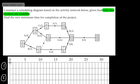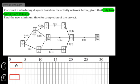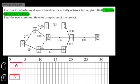Let's start with Worker 1 — we give them activity A, which can start from the beginning. I'll write A on the scheduling diagram and mark it off. Worker 2 is also ready to start, so we allocate them activity B and mark that off too. Once Worker 2 has completed activity B, we consider what's next. Worker 2 could start activity E, which depends on B only. We can't start C yet because C requires A to be complete. So we allocate Worker 2 activity E, which has a time period of 4.